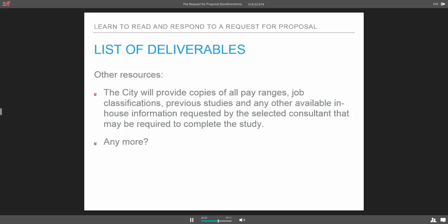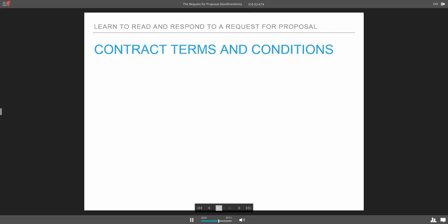in that session, in that setting, you don't want to blurt out, of course, if I come back, you'll pay me an additional $1,000. But, in this particular case, you might spell it out in the RFP. You get one meeting according to what you're requesting. Each additional meeting would be available at this price. And go ahead and spell out that if it's unclear in this deliverable, so that you can let them know ahead of time. And that way you're covered, and that expectation is what I would refer to as collared in your process.